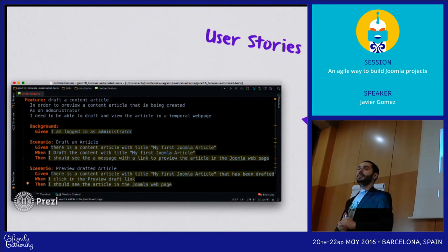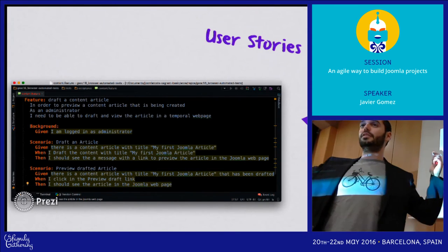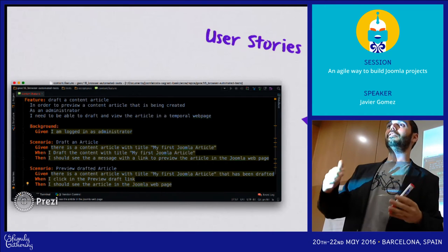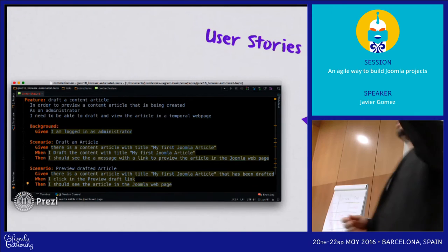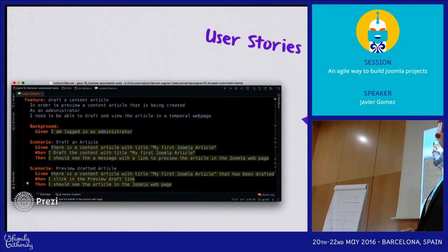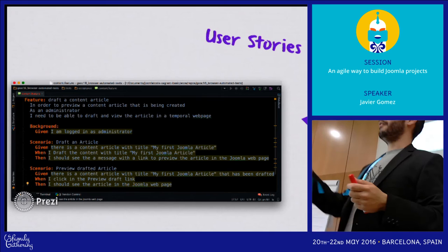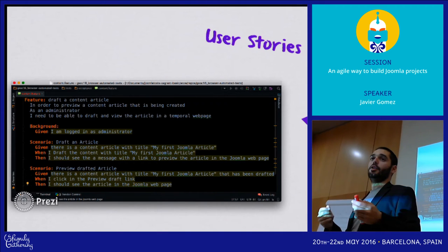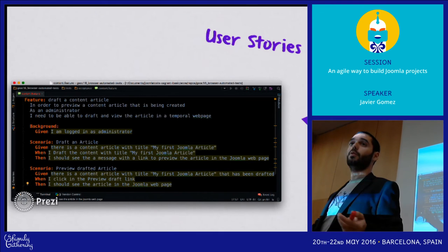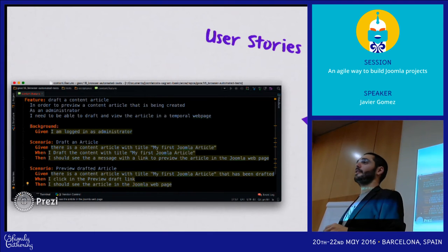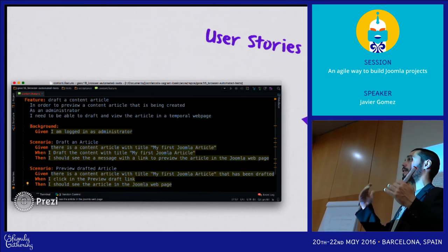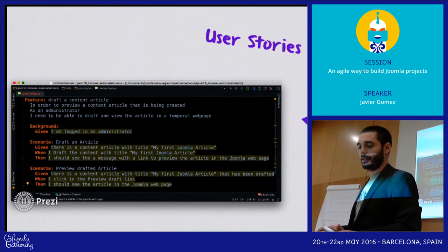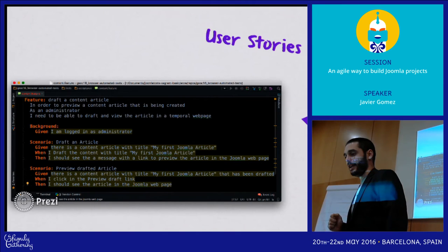Okay. What do the others think? Do you think it's S, XL, or will you put it at an M, the average? I think it was an M or L. So it's surprising that someone just says XL. It's good to ask why. Why does she think it's XL? Because maybe others haven't thought of something that could add more effort and could make us fail on the estimation.